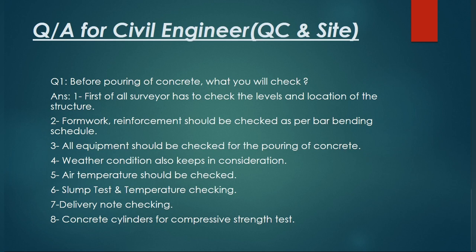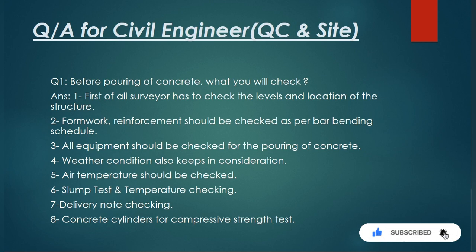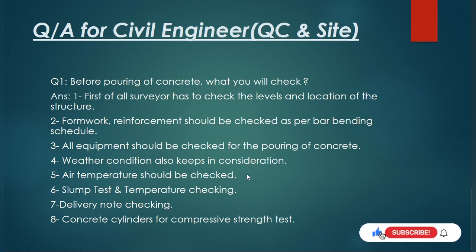The eighth point is concrete cylinders for compressive strength testing. We have to cast the cylinders on-site to check compressive strength after 14 days and 28 days. These are the general points to check before pouring concrete, and most interviewers ask this question during interviews for both site engineers and QC engineers.